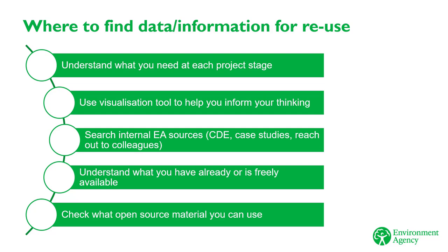Your discovery may start with conversations with your colleagues, review of project case studies, and other material that should point you to sources of information generated by others that you can repurpose. You should also search the Environment Agency's A site, CDE, for deliverables from other projects. Understand what you have that is already freely available.